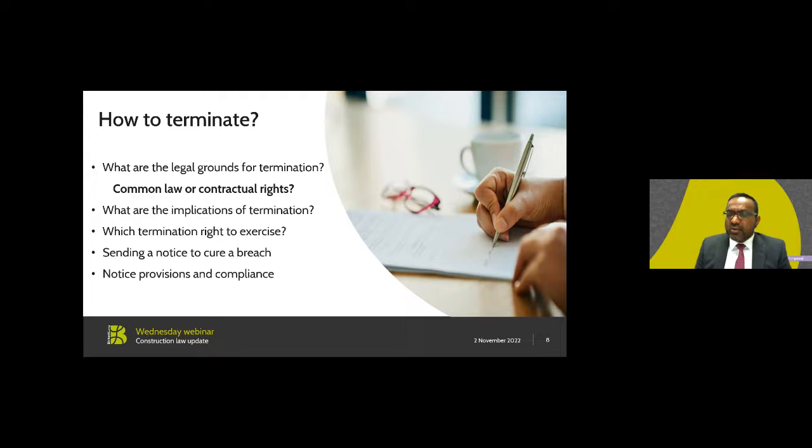In order to decide whether a breach of contract amounts to repudiation or repudiatory breach, you need to identify whether there's been a serious breach, which I would say goes to the core of the contract. For example, if a contract provision makes time of the essence for the performing of an obligation or a duty by a clear deadline, or within a particular timescale, then even a small delay would give an innocent party the right to terminate.